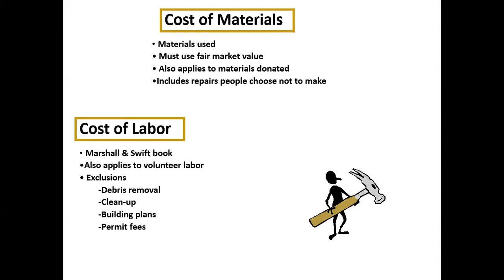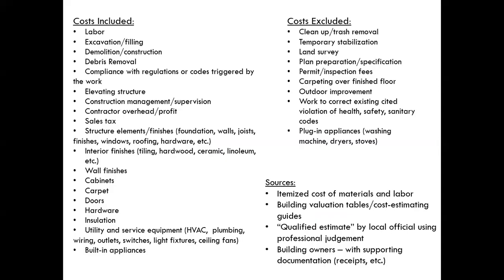So again, there's cost estimating guides. But what you can exclude is debris removal, cleanup, building plans, and any permitting fees. You can even waive the permitting fees to help people out if you choose to. But again, the desk reference goes over all of this in detail, so I don't have to go through every single one of these.